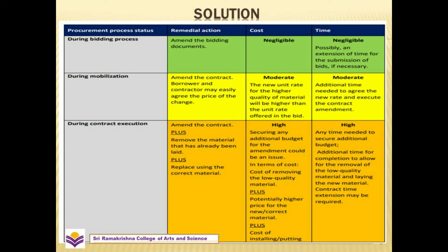In the second stage of the procurement process — during mobilization — if we found any defects, we would be in a position to amend the contract. The borrower and contractor may easily agree on the price of a change, and it would involve moderate cost. The unit rate for the higher quality material will be higher than the unit rate offered in the bid, and the time concern is moderate — additional time needed to agree on the new rate and execute the contract amendment.